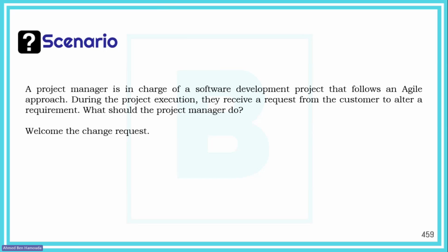And then if we are in that first week and the customer asks for any changes to be added to the sprint, then yeah, we accept that, because the next week we will start with a 2 hour planning meeting. This way, we're capable of accepting changes, because in the entire sprint we will have 4 planning meetings, each of 2 hours.